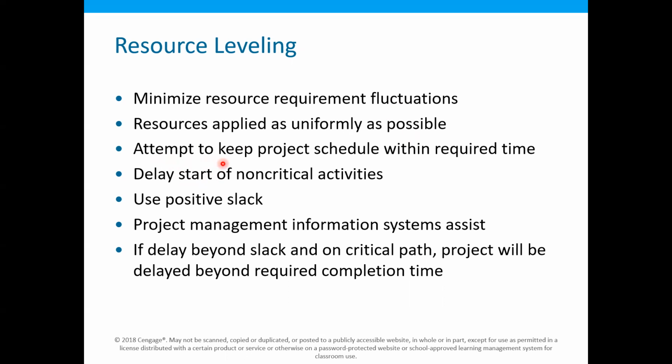And this resource leveling attempts to keep the project schedule within the required time. So the first priority in resource leveling is that we do not change the overall schedule of the project. That means the completion date of the project is not changed or delayed by this change of resources. So we will see how it is possible, and also we will see that sometimes it is not possible.